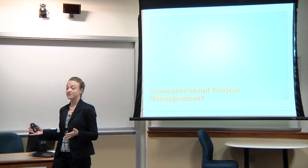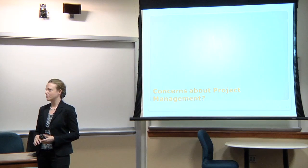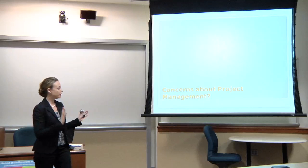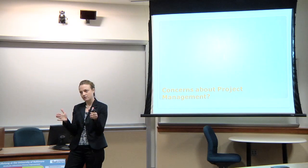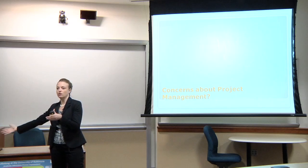You may say, okay, I think this is going to take 3 weeks as long as everything falls into place. But then maybe somebody's supposed to respond to a survey and you don't get enough survey responses, so you have to add on a couple of weeks. The beauty of putting together a Gantt chart is that if you have 3 weeks set up for something and then all of a sudden something happens and you need to add time, you know how that's going to affect everything else in your project plan.